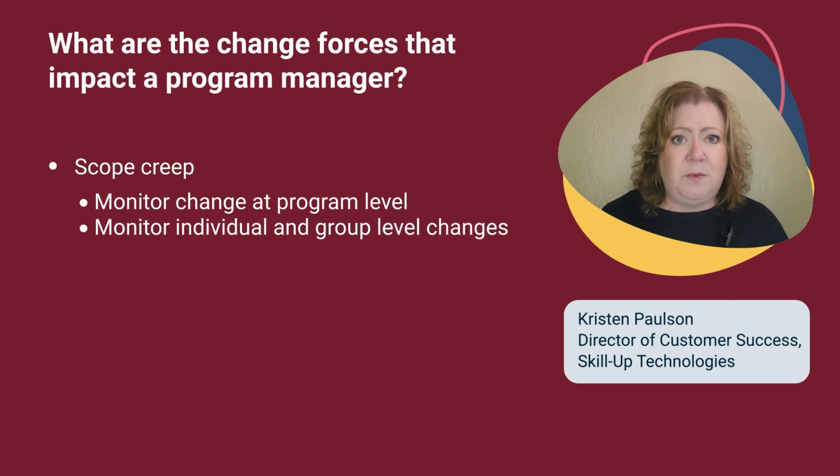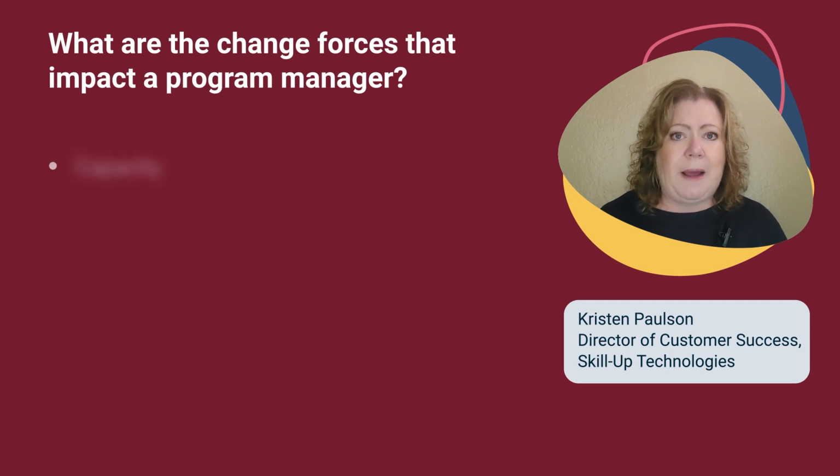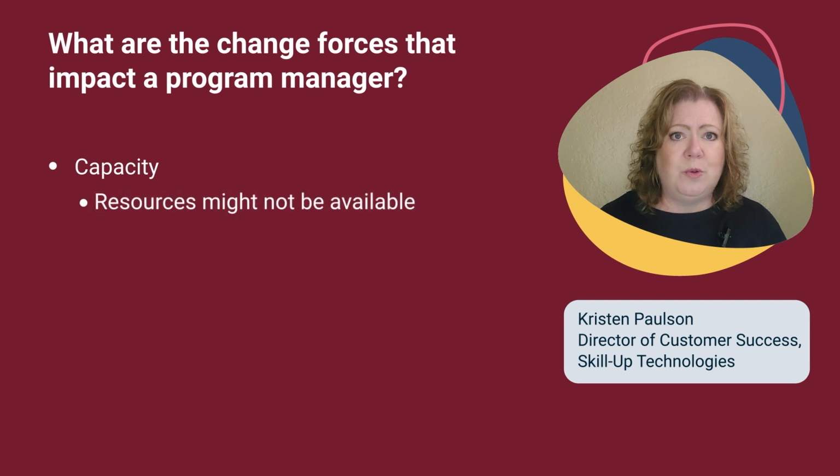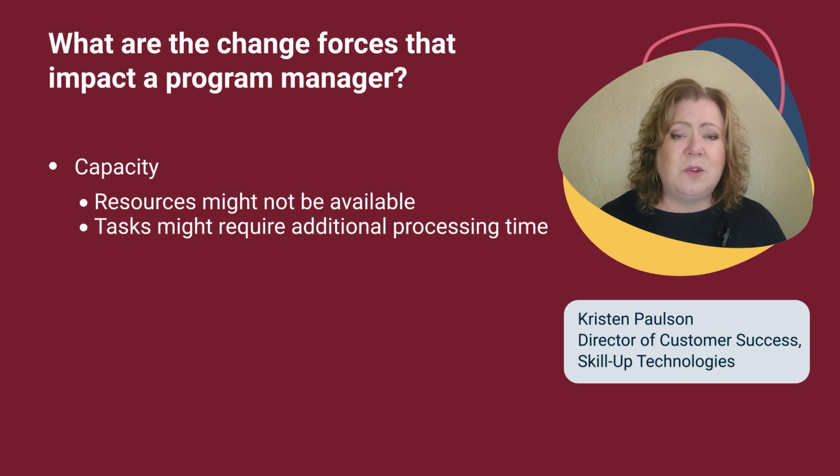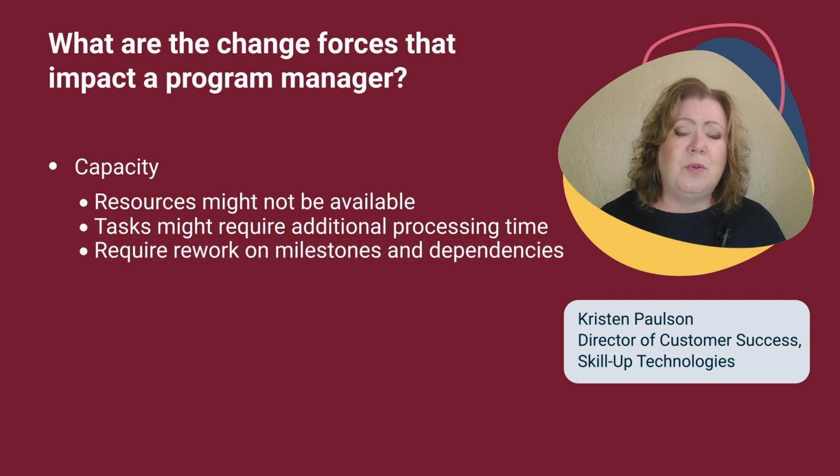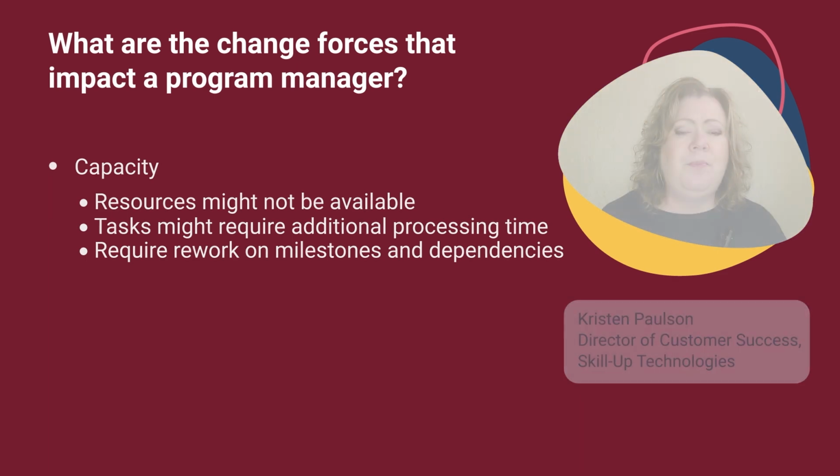Additional items that may affect your projects and result in change are just from a capacity perspective, if you have individuals who have to be away from the project for a while, if you determine that a specific task or a specific input is going to take longer than what was originally planned, you may have to rework not only the milestones to achieve that deliverable, but other milestones that are dependent on that deliverable.